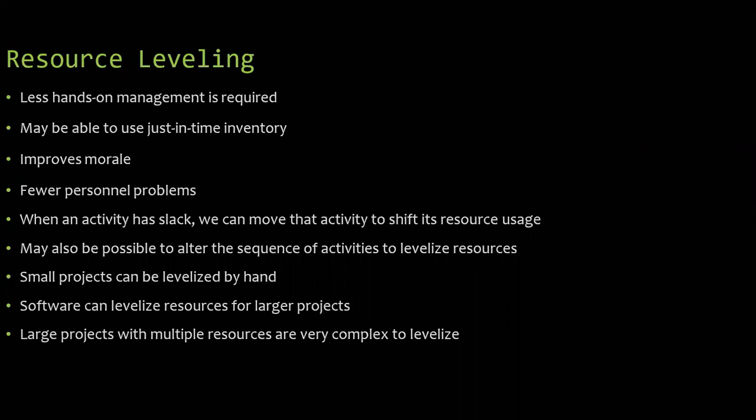Then what are the other activities apart from the critical activities? These are called non-critical activities, and those non-critical activities we can shift a little bit here and there. Okay, so that with proper resource allocation and proper resource leveling, each and every resource can be utilized. Proper resource leveling and allocation are possible.